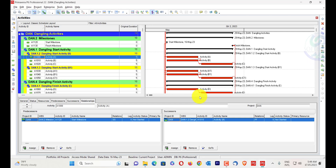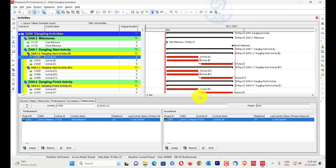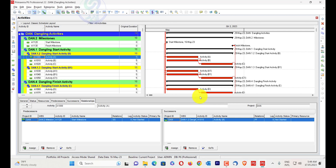A dangling finish activity is an activity with a finish end that is not governed by its successor relationship. It could have a relationship with its predecessor such as finish-to-finish or start-to-finish, but it is still dangling because it can finish any time without affecting other activities in the network.